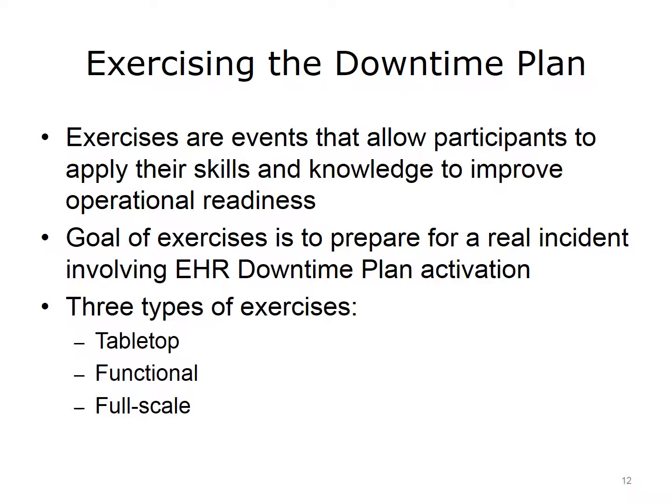Exercises are usually followed by after-action reviews, such as those done in the military, where everyone involved talks through what happened, what went well, and what went poorly. Notes are taken so that the downtime plan is improved.